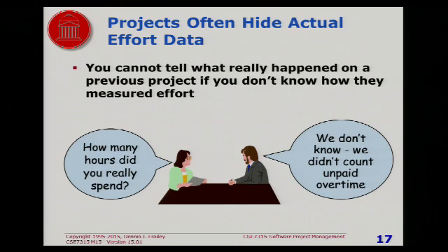Well, then what happens when you make an estimate for your project and you estimate, well, I'm doing something almost identical, so I assume it's going to be about 83 hours. But in fact, it's going to be over 100 hours because of all that overtime they worked on the last project and never reported. So you run into this problem that you're digging a hole for yourself.